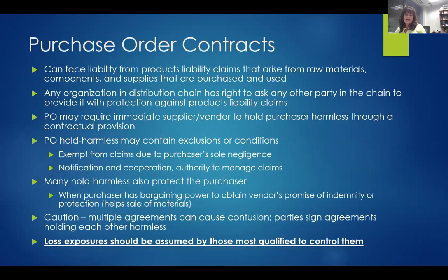Purchase orders. So this is how we typically pay for every other type of work, whether it be buying a product or implementing a service contract. And our department in risk management, we typically review every purchase order for every service and for every product we're buying, and we implement some kind of contractual review of what we'd expect to see our contractors to have in terms of liability insurance, property insurance, auto liability insurance, and make sure that's in there.